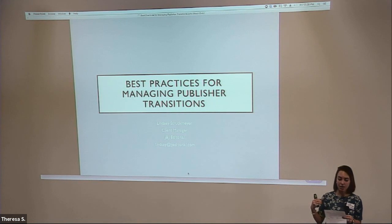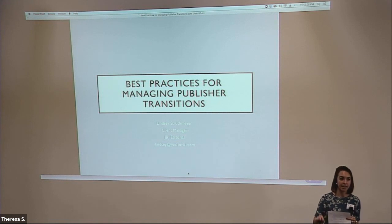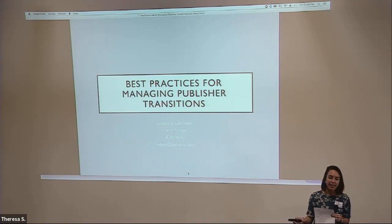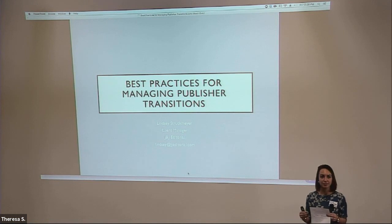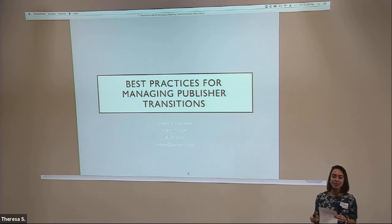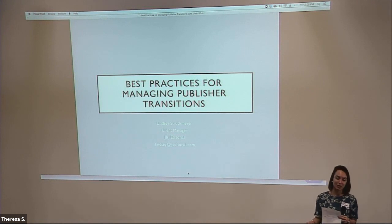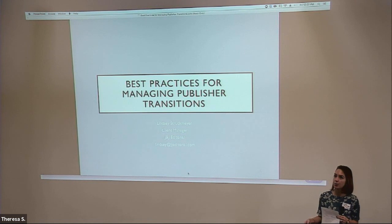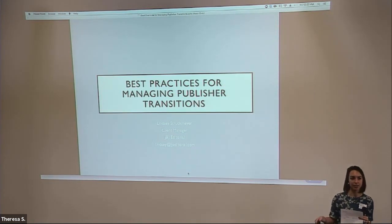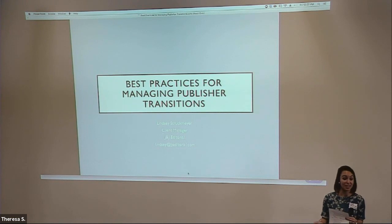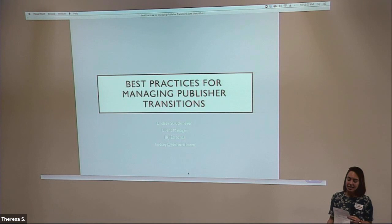Sometimes the new publisher has to get archive material or things like that from the old publisher — that can require some diplomacy, because sometimes your old publisher isn't in a big hurry to do those things for you, while your new publisher and editorial team are very eager to get things off the ground. It can also sometimes be hard to know who to communicate what to. And your timeline, even if planned really well, often things take longer than expected — so building in buffers or windows into your timeline can be really helpful.